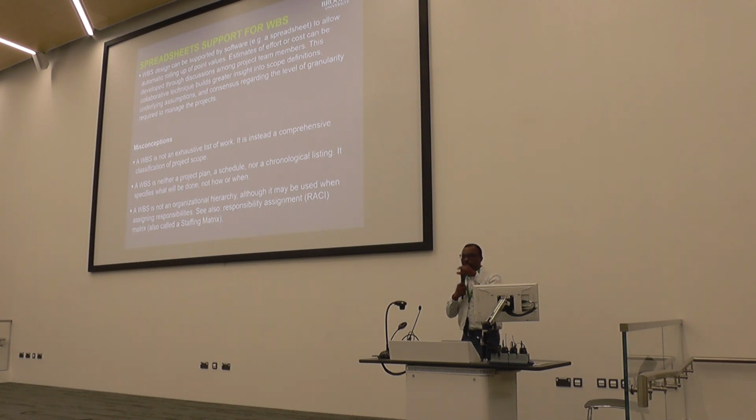So if you come up with, let's say, your services, you have your mechanical, your electrical, and within these two, you also need to identify what goes into your mechanical, what goes into your electrical, and what sort of interface should exist. Will the electrical contractor provide power to the M&E services? What risks should I assign to the electrical contractor in doing that?